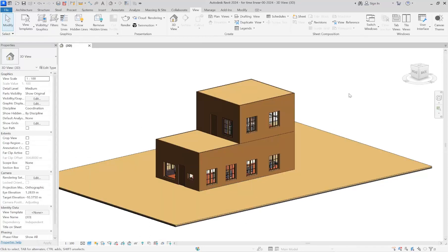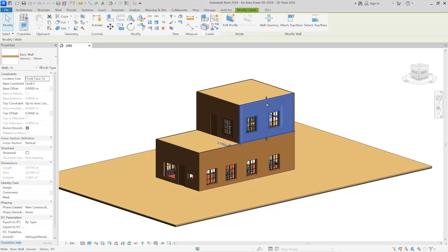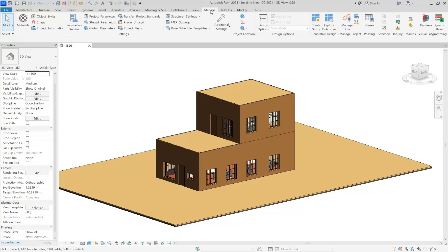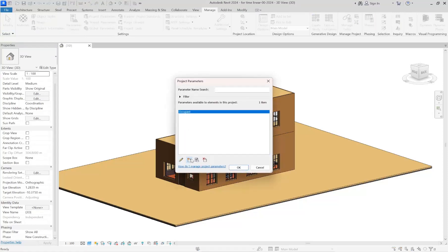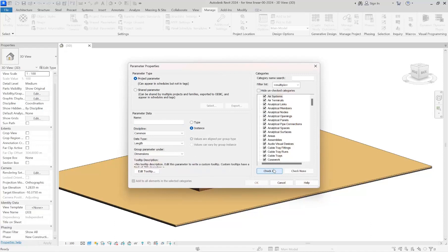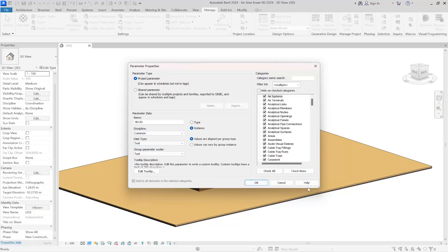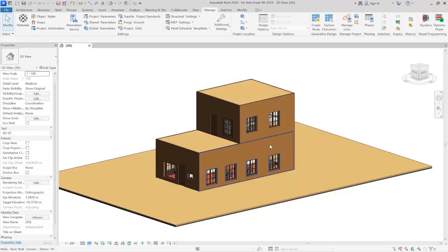Now let's get to Revit. First of all, you should define a parameter for each object that is specific to 4D. As you can see, there are blank fields like comments and mark, but we are supposed to make an exclusive parameter for 4D for each object. To do that, go to Manage > Project Parameters, make a new one, select all categories you want, select Instance, name it 'ID' — the same name chosen in MSP — and set the data type to Text since we are writing a code.